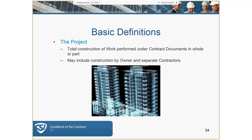Saying 'by others' on engineering documents — for example, 'electrical component by others' — is incorrect. That means it's not part of the project. All documents are directed toward the general contractor. Keep in mind the exam is mostly based upon the concept of a design-bid-build with a single entity as the general contractor.